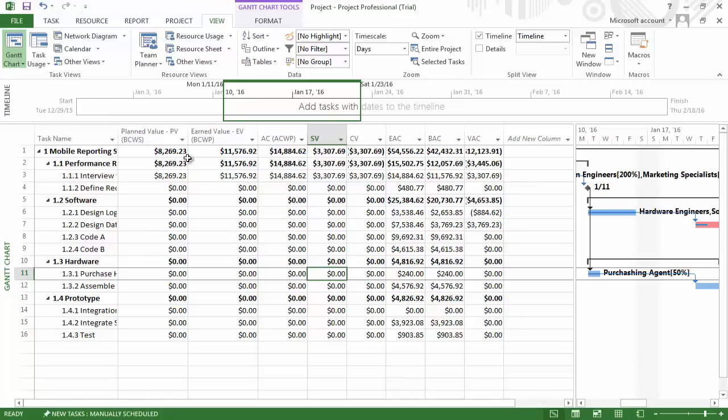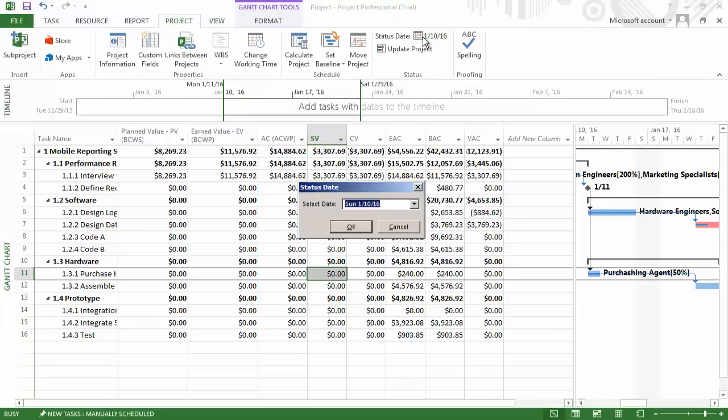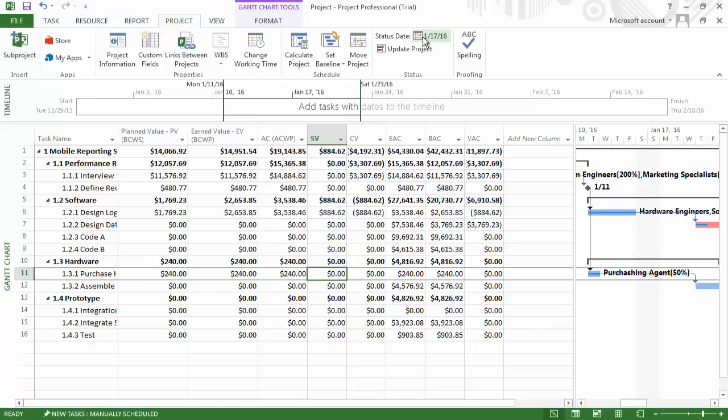If we change the status report date, let's say our date is changed to the 17th of January, we can see that the earned value indicators will reflect that change.